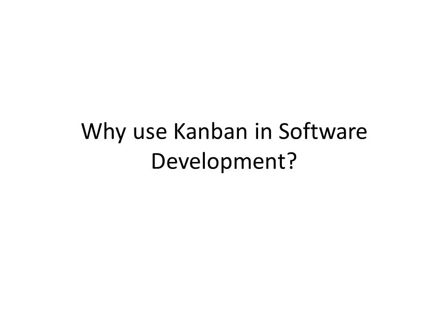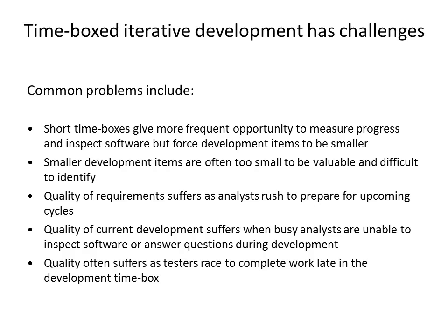So why use Kanban in software development? Well, the methodology for time boxing, like in Scrum, sometimes is not effective in addressing all the different needs. For example, in our own development practice, we use Scrum primarily for the development activities, while we move to Kanban for the maintenance. So sometimes the time box is an obstacle.